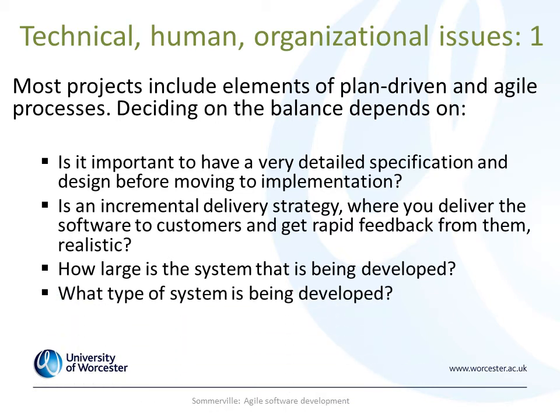What type of system is being developed? Plan-driven approaches really are for systems that require a lot of analysis before implementation. Real-time systems with complex timing requirements, things that might be critical.